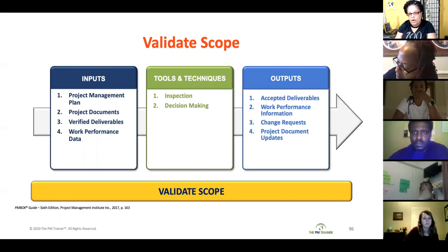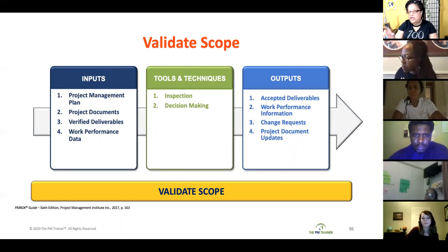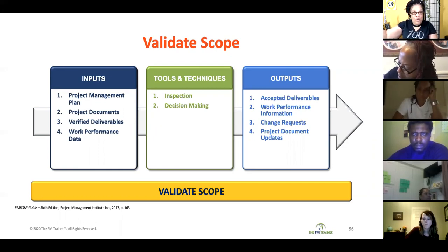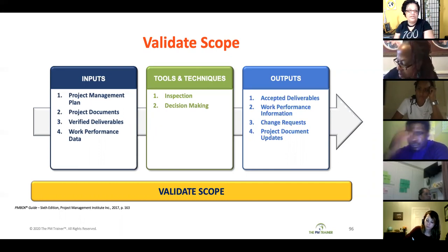And then your requirements traceability matrix is used to trace your requirements back to the project objectives, and then also to trace it through to the deliverable that it's a part of, through the use case or the test case that it's going to be tested by, right? And to the stakeholder that requested it. So now when you go to verify that deliverable, you know exactly the list of requirements that went into that deliverable.